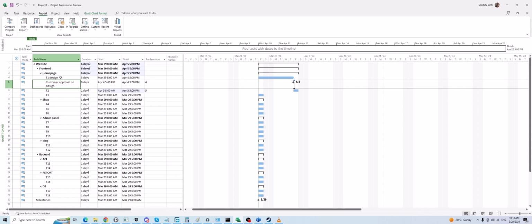So milestones, that's why I mentioned, if you open the project plan, a schedule plan, and you do not see these kinds of milestones inside your plan, then it means that plan is not a proper plan. I can blindly say that is a very poor plan if you do not have milestones for prerequisites of your project, for external requirements, for deliverables of your project, for all these approvals, similar things that are required on your project.